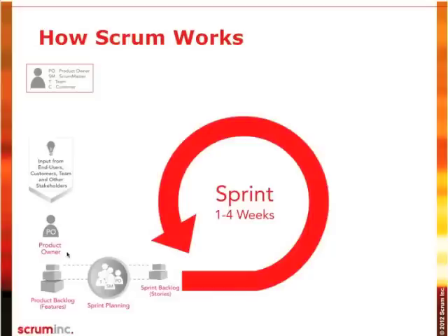The sprint is the central feature of the Scrum process. It lasts between 1 and 4 weeks, and it's a regular, discrete unit of time over which the team tries to produce a meaningful increment of product. By having the same period of time over and over again, the team can conduct experiments with their process and decide whether they can actually accomplish more or less in that same time period with the revised process.